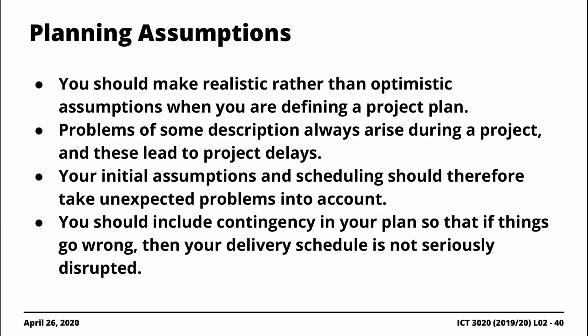Of course, there are certain assumptions that need to be taken into account as part of planning. You obviously have to be realistic about things here. Very important. No need to be optimistic. You want to make sure that you're realistic as you're defining a plan. It's usually a good idea to overestimate the number of people required to work on a particular activity rather than underestimate, for instance. That's being realistic. So rather than say, oh, we expect just one developer to work on this particular feature of the software, you're better off saying, maybe we need 2 or 3 people to work on this particular feature of the software.